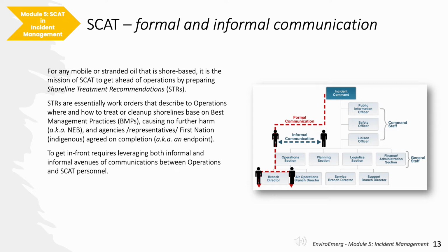The formal communication by SCAT to operations is by the development of and forwarding of a shoreline treatment recommendation form, referred to by the acronym STR. STRs are essentially the operations work orders and assignment for each shoreline unit selected for treatment or cleanup. This is done under the ICS chain of command.